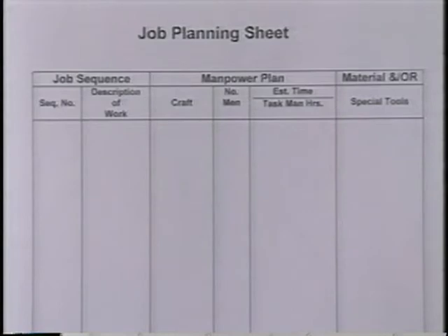Operation 1 or sequence 1 is preparation time. 2 would be travel to the job site. Now 3 would have a series of different sequences depending on the activity that is required, and when I'm through with all of the work, then the next following sequence would be travel from the job site either to the next work order asset or back to the maintenance shop.